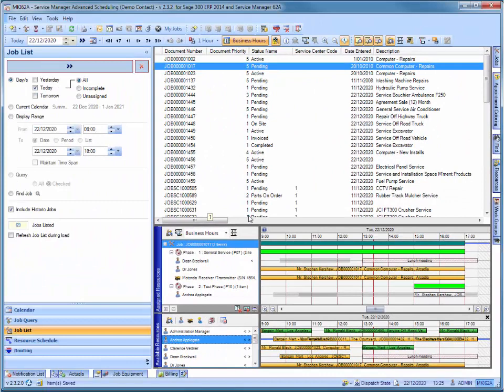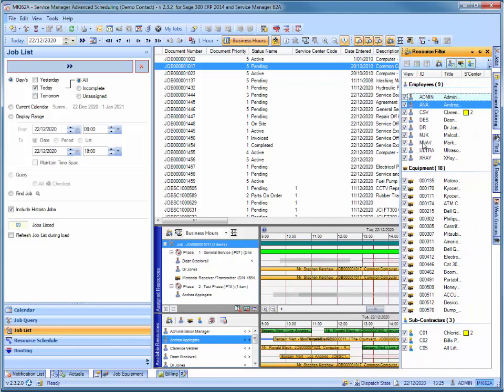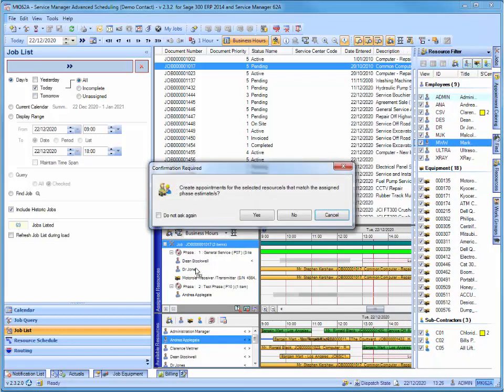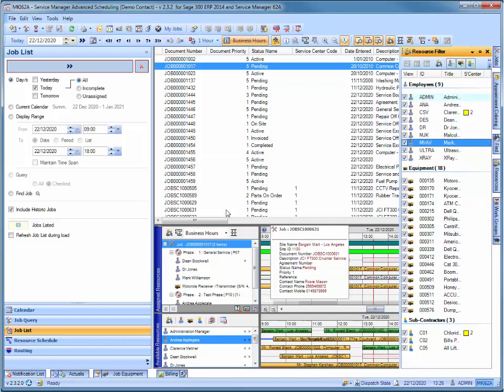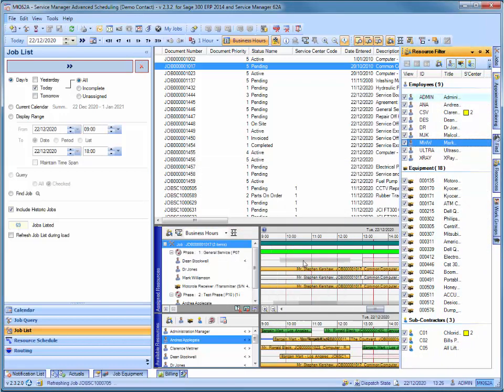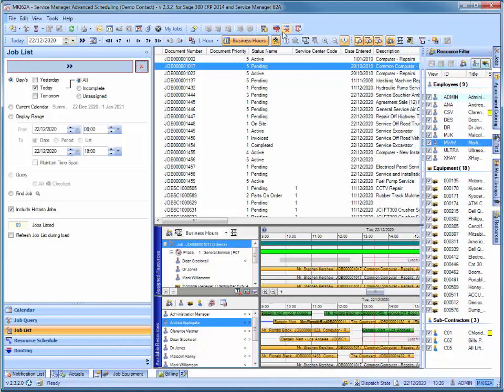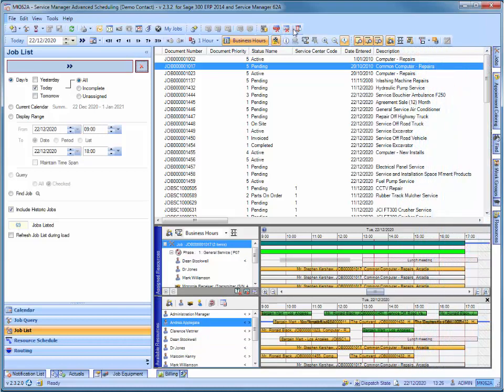As per the calendar view, you can use the resources flyouts to assign. You can add a single resource or all members of a particular work group or skill to the job by dragging it. Appointments for other jobs appear ghosted in the Assigned Resources window. The Job List toolbar gives you some shortcuts to clear the selected job or clear all jobs. You can also opt to show out of hours or weekends patterned in the view using the Gantt View toolbar options.